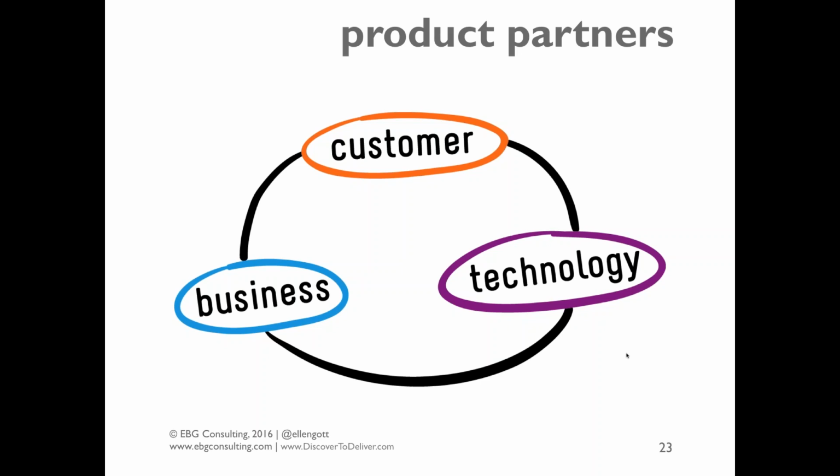We've also seen situations, and maybe you have done that or seen that, where there's an overemphasis on one type of customer. An example of that, unhappily, was where one organization focused so well on users they forgot about the choosers. And they ended up having to ditch a year's worth of effort because they failed to consider the buyer's need, that chooser.